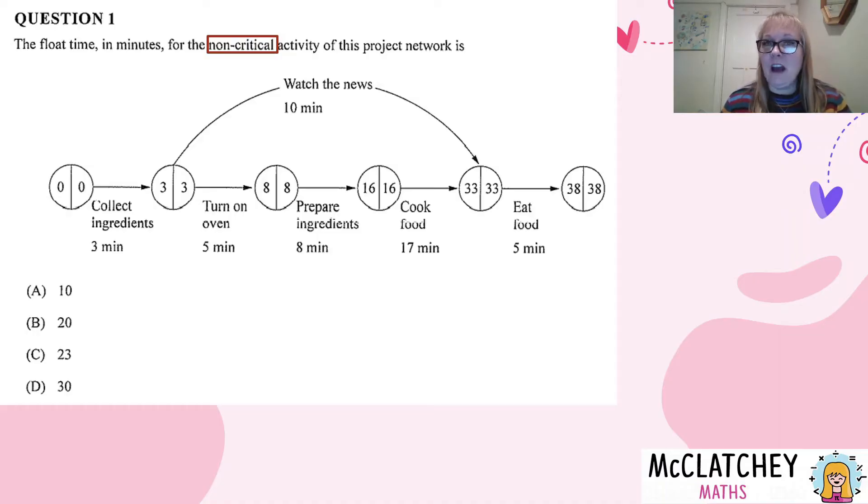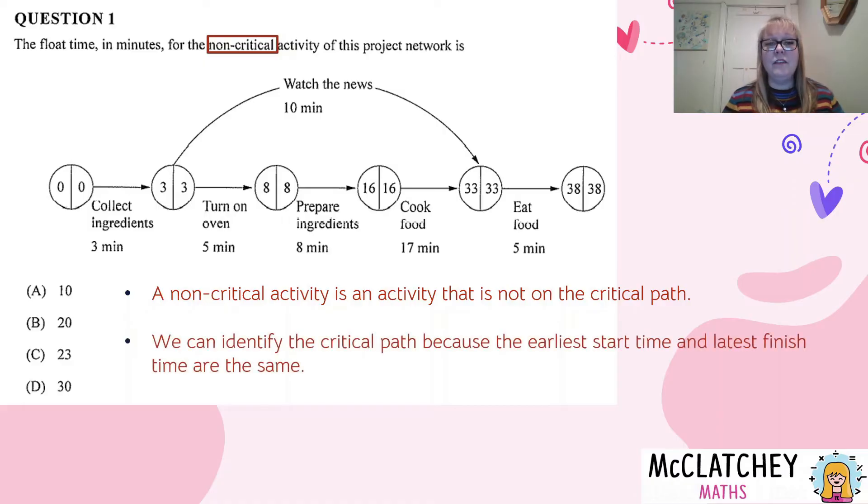You might be wondering, how on earth do you find a non-critical activity? Well, if you would remember, it's an activity that's not on our critical path. To find the critical path, we are looking where our earliest start time, which is the number in the left-hand side of our bubbles, is the same number as the number in the right-hand side of our bubbles, which is our latest finish time.